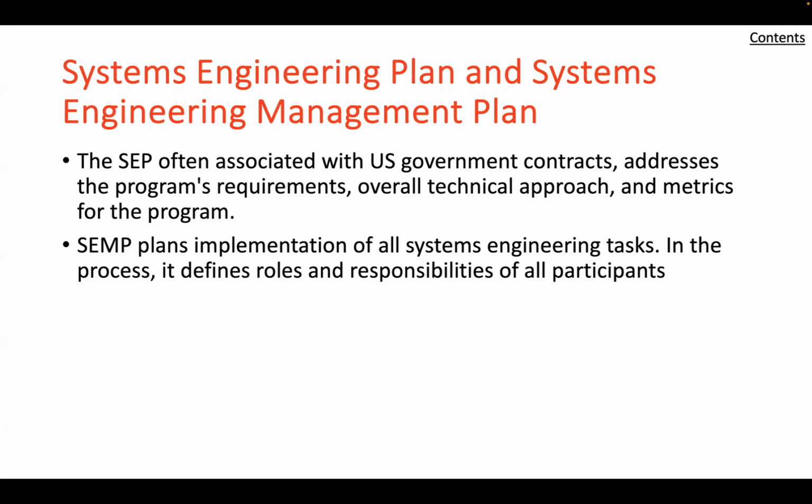The SEP would be updated as plans are modified, development progress is made, known risks are mitigated, or significant changes occur, new risks are identified, and new technologies are adopted. The SEP captures government, that is the customer, technical planning expectations from their perspective. It provides contractor guidance for systems engineering as applied to the acquisition program. The SEP communicates the technical management approach to the program team, stakeholders, and contractor teams, and is required for milestone approval.